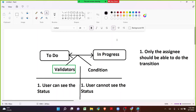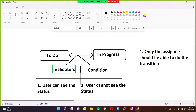Imagine in the Hyundai project, in the issue type Services there is a workflow where we can move the issue from To Do to In Progress. If each and every person in Jira or in the team has the issue key and accesses the view issue page, even if they are not the assignee, when they click on In Progress the issue will be transitioned — and that should not happen. In most organizations, people use multiple conditions on workflows, and one of the conditions is: only the assignee should be able to do the transition.